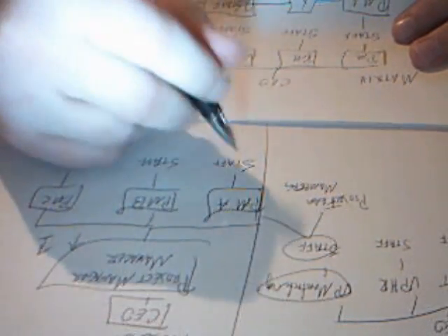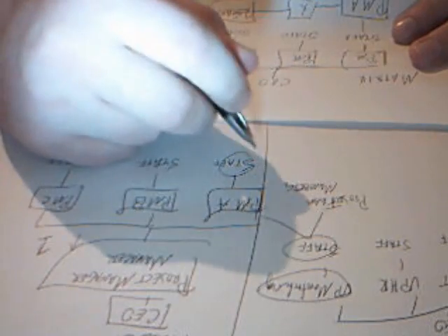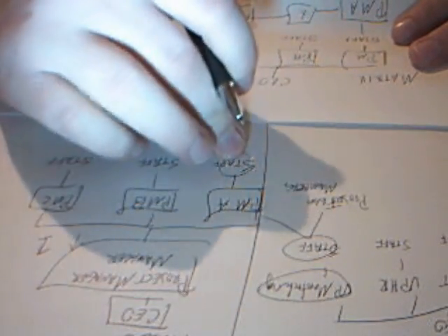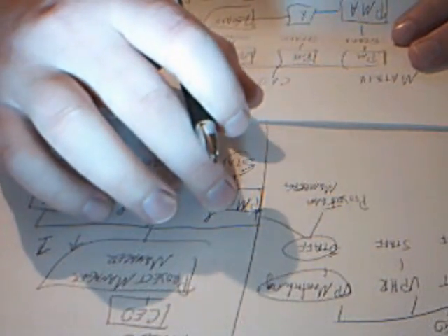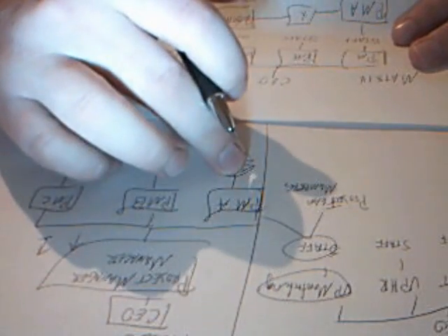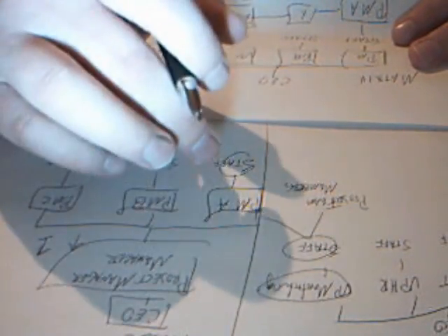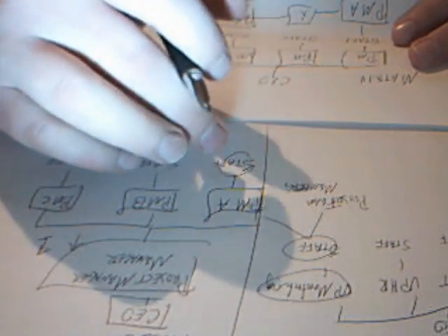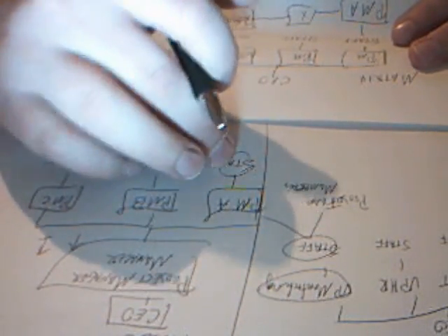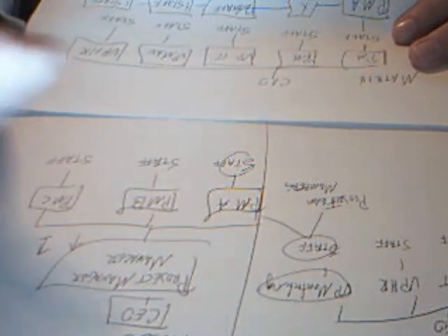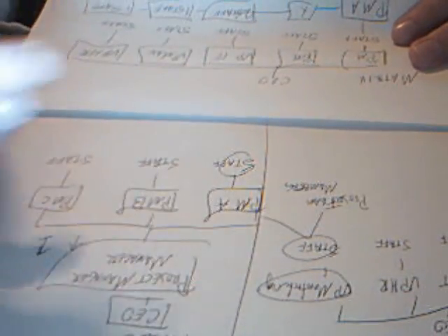So if this guy here is some sort of illustrator, drawing pictures just for project A, and he finishes drawing all the pictures, but the project isn't complete, or we've agreed to hire him for 6 months or 1 year, those days that he's sitting around, we're wasting money, because he's just sitting there not doing anything, waiting for work to come in.